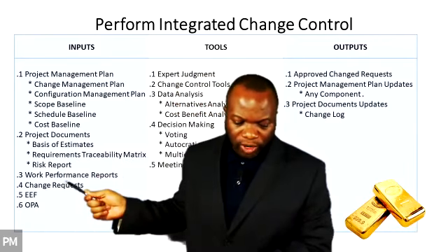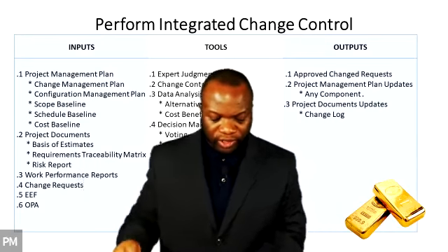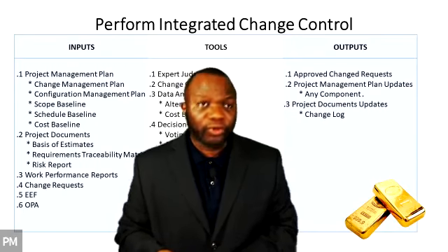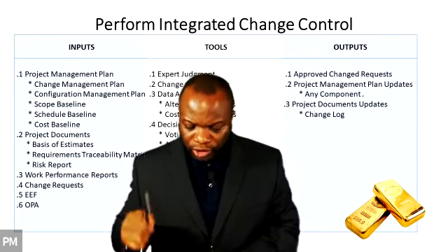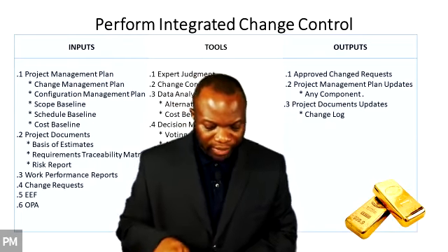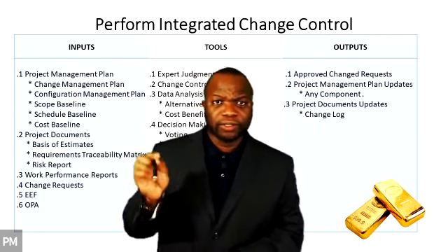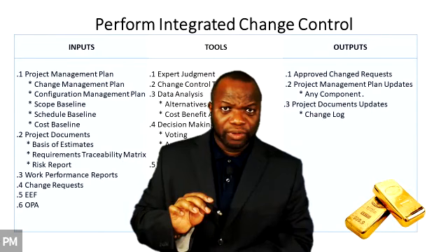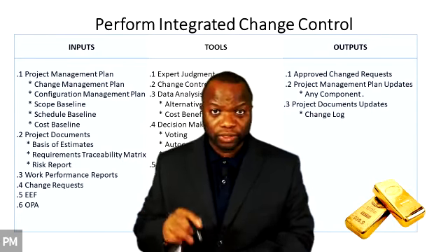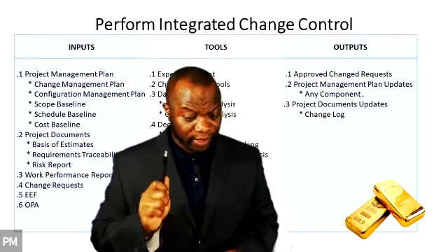Go into our next one. This could be CAPADRU. And it says here on page 117, change requests that have an impact on the project baselines should normally include information about the cost of implementing the change. So there's a very intricate map of how change requests should be considered. Hold on to that thought. We're going to have to talk about that.